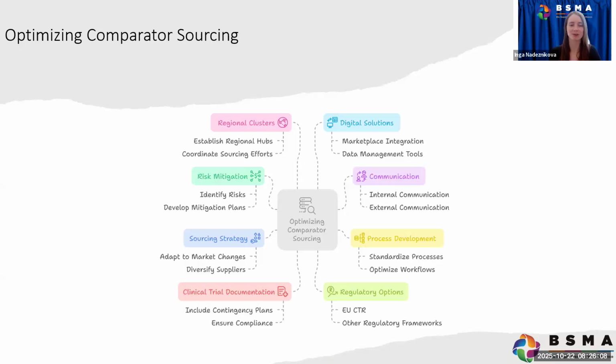the hard way, especially with the current changes in a generic market in Europe, that we do need to have at least 2-3 presentations as a backup already set up and ready to go. So those are just some of the assessments that we're doing at an earlier stage, just to set ourselves up for success. I mean, that's great to hear that you're doing this at a very early stage, and it sounds like you have a say on what is going into the protocol to provide you more flexibility.